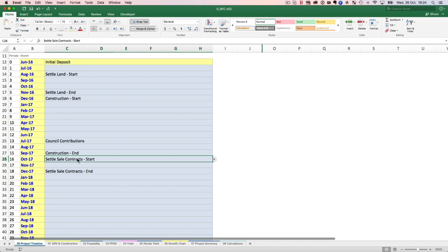And it took another 2 weeks for Westpac to come back, and then it took a week for the land surveyor and the lawyer, and then they were actually lodged with the titles office. Title office took another 2-3 weeks, and that's when we got the title. So it took me about a month because I couldn't settle on my pre-sales because I didn't have any title.